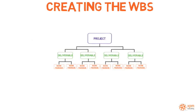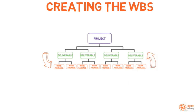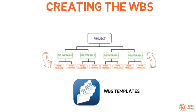There are different approaches for developing a WBS. You can adopt a top-down approach, decomposing each deliverable into smaller components. You can use a bottom-up approach, developing the WBS by integrating other previously planned WBS for different sub-components of the project. Finally, you can accelerate planning by using WBS templates previously established in the organization.